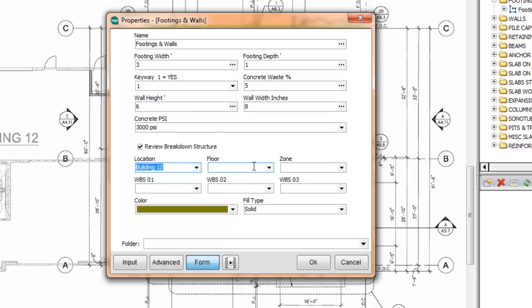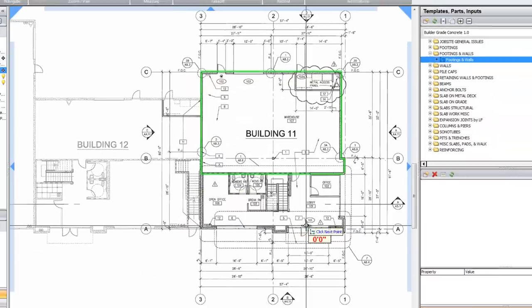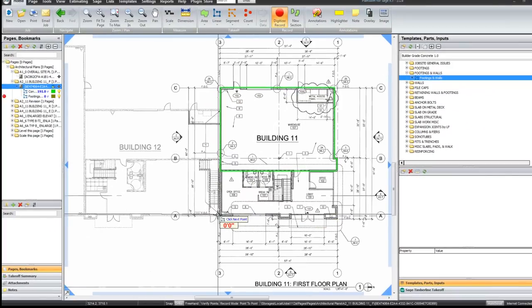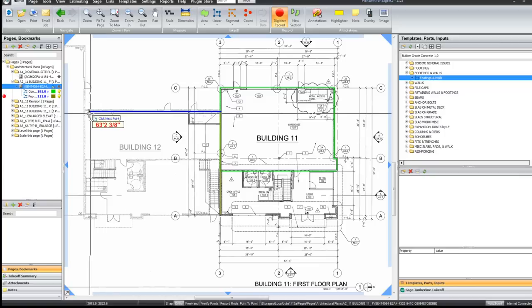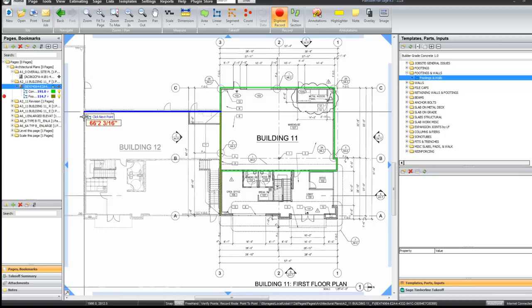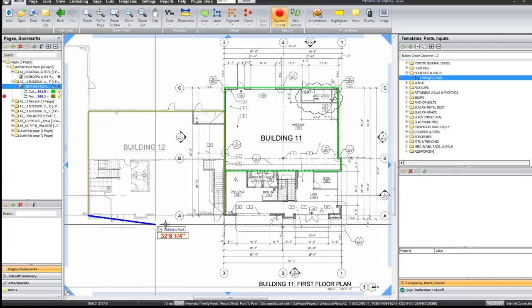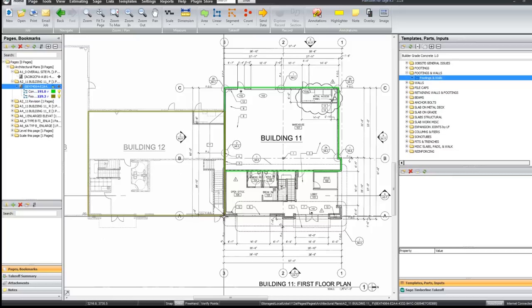The breakouts I am going to put in. This is building 12. It still belongs to the foundations and it is still on straight time. I click OK and again I am in my takeoff mode. So now I can come in and quantify this takeoff for these foundations here. And when I am complete again I click escape and that takeoff is done.